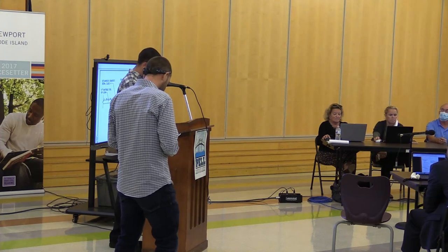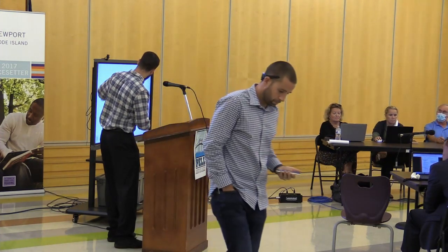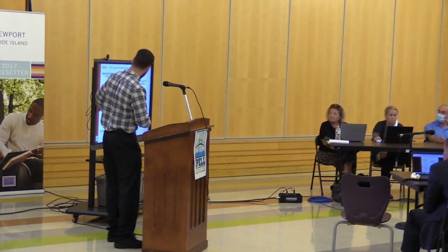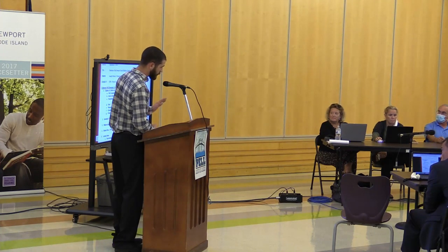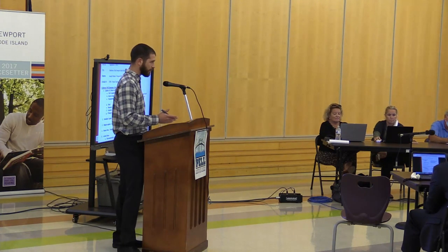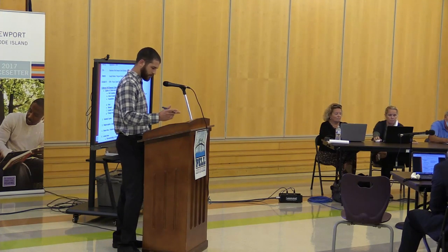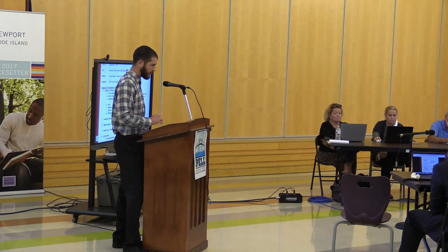All right. Next item, the change order working group. I apologize, that says subcommittee, but I learned we don't say that, so it's working group. Becky and Louisa have been working to form a change order group with the school building committee, which is going to review the project change orders and recommend approval to the remainder of the group and then to the school committee.